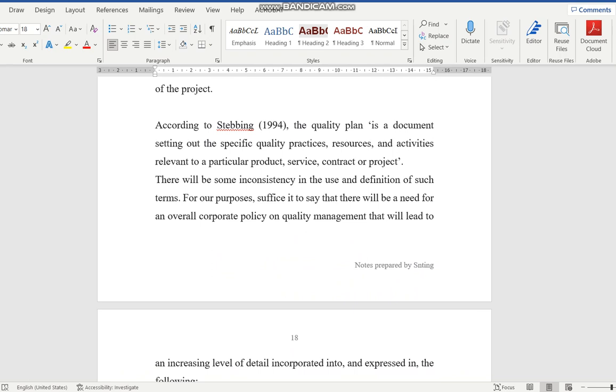They are actually just a lot of processes, a lot of procedures. It will list down the whole outlook of how you will carry out different activities, ranging from the objective of the activity, the desired level of quality excellence for that particular activity, and then what are the processes, the steps that need to be done, the procedures, the work method, and then the skills of the people that are needed, and the desired quality material that are needed, the machineries that are needed to deliver this product.